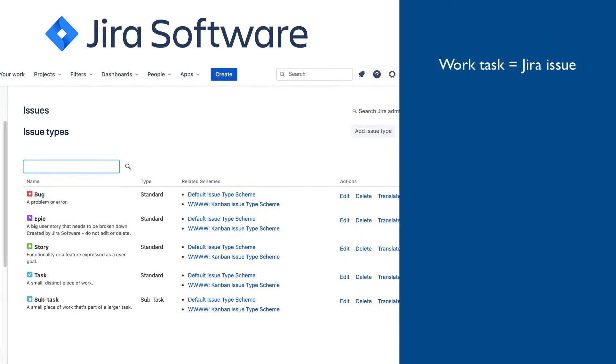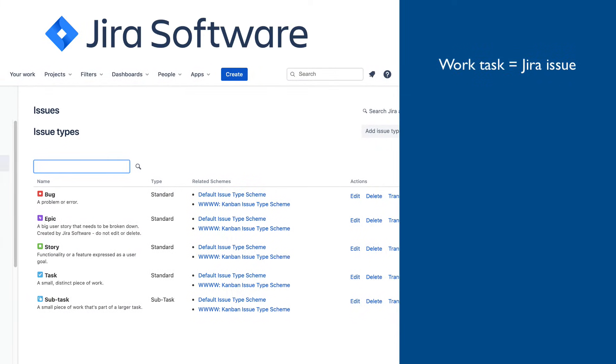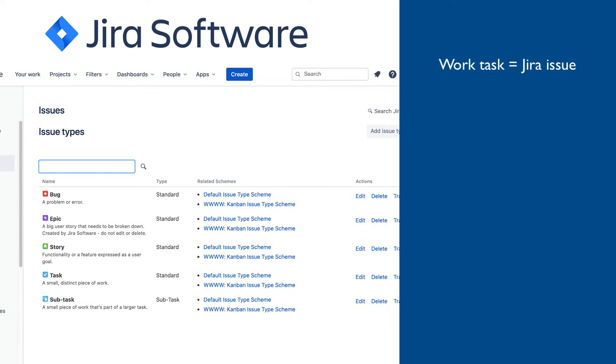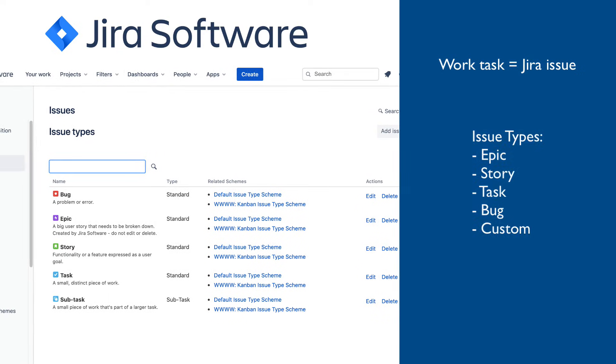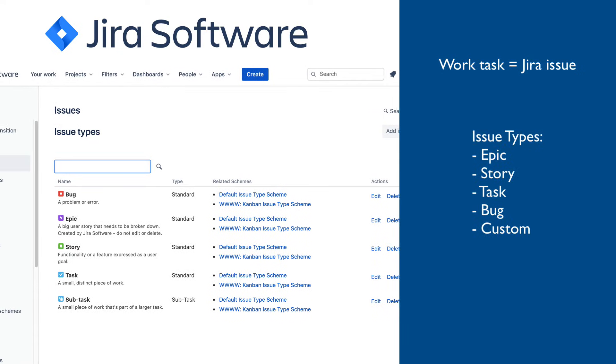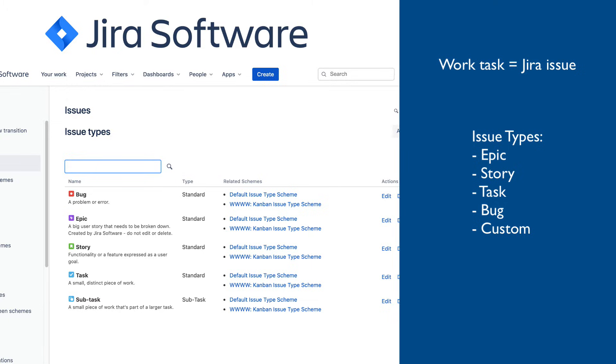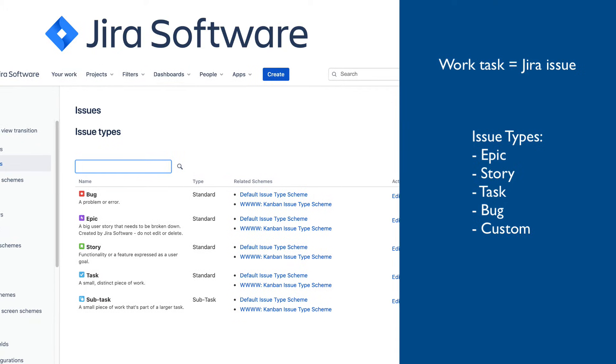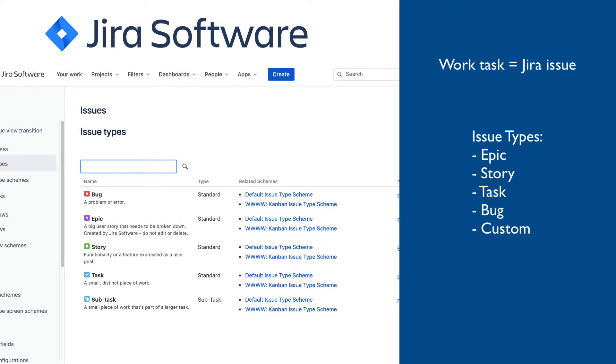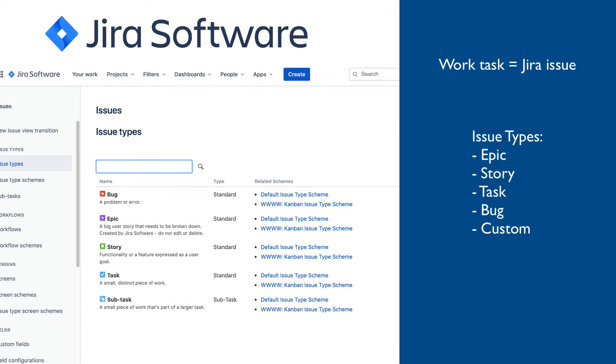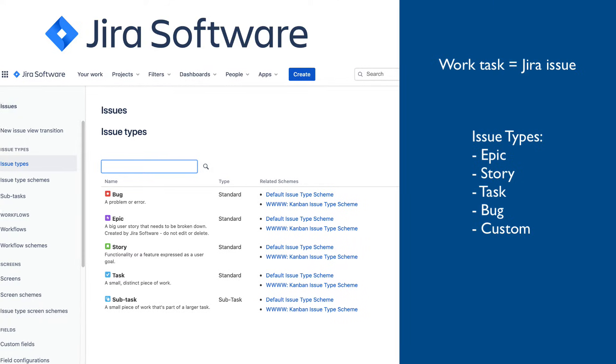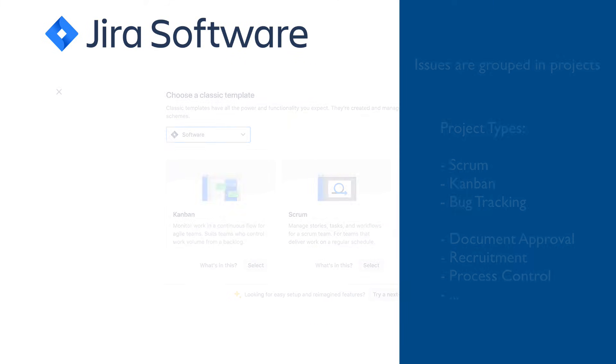In Jira, work tasks are defined using Jira issues. There are several predefined issue types, such as epics, stories, tasks, and bugs. Jira is very agile-centric, and that is where these specific task types are coming from. However, custom types can be defined as well.